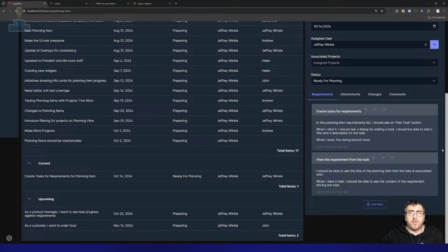Four projects, a lot of time, starting all four is going to be a major issue. That was one of the things we went into in terms of parallelization and context switching at that training course. The idea that if you start four projects at once, they might take just as long as starting them serially, but the quality of them is likely to be lower because you've not taken them at the right pace in the right order.